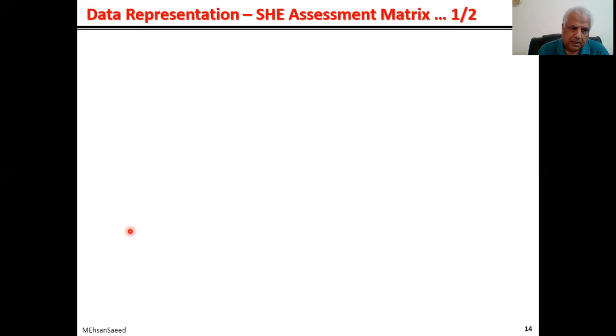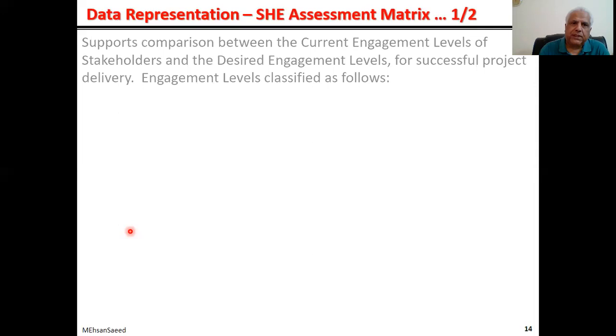As the project proceeds and the stakeholders start engaging with the project, not necessarily when the project actually starts, even it could happen in the initiation phase or planning phase. And that's why we identify stakeholders very early in the initiation phase, because the stakeholders are going to start engaging with the project very early. So if the stakeholders start engaging with the project very early, it is important to start assessing their engagement level with the project. And this is usually done through this particular tool called the Stakeholder Engagement Assessment Matrix,